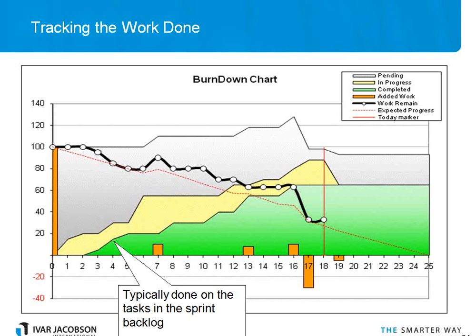So this is for typical Scrum. We may get some work coming in. Although we try and protect the team, there may be additional work that needs to be taken on board. The pending line shows how much work in total there is to be done at the top. We can see how much is in progress, and how much has been completed.